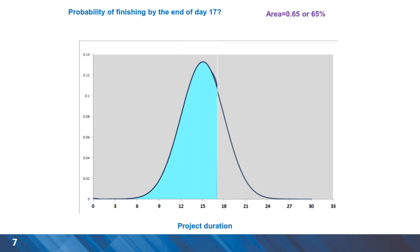For any duration greater than 15 days — the expected project completion time — we have a greater probability than 50%. In this particular example, we have a 65% chance that the project is completed at 17 days or sooner.